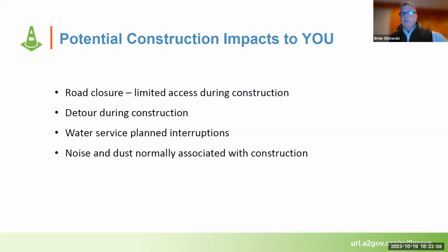These are typically where we're doing a major connection and switchover, maybe on the order of a couple hours on a few days. That's generally how that works. And then there's a much shorter interruption, where it's almost a knock on your door, because there's going to be about a 20-minute period where we're just switching your service from your house from the old water main to the new water main.